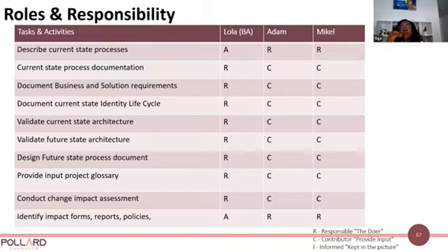So prior to your meeting with them, you can come up with some high-level activities and tasks. At this point in time, you may not know all the tasks you need to do with that stakeholder, but you should have put in some thought to it to understand where they will come in. So typically, if you can come up with a RACI matrix telling them what they have to do, where they come in, that would also be very good.